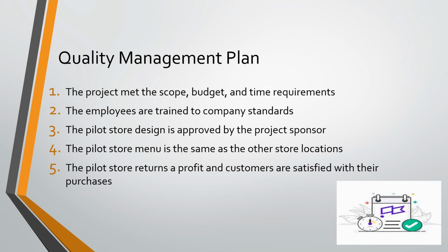The quality management plan determines if the project team is creating a quality product or not. It also depends on what the customer wants. Our team decided that the project was a success if it met the following criteria. One, the project met the scope, budget, and time requirements. Two, the employees are trained to company standards. Three, the pilot store design was approved by the project sponsor. Four, the pilot store menu is the same as the other store locations. And five, the pilot store returns a profit and customers are satisfied with their purchases.